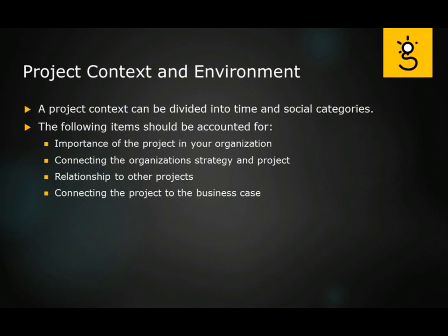A project's context can be divided into time and social categories. And in that, some of the items you should look at are things like the importance of the project in your organization. That could be a social category. Connecting the organization strategy and the product. Its relationship to other projects, where that can be a little bit of a time issue, as this project has to finish before another one can start. Connecting the project to the business case, of course. So a lot of these things are what we want to look at and account for as we're building the project's context.